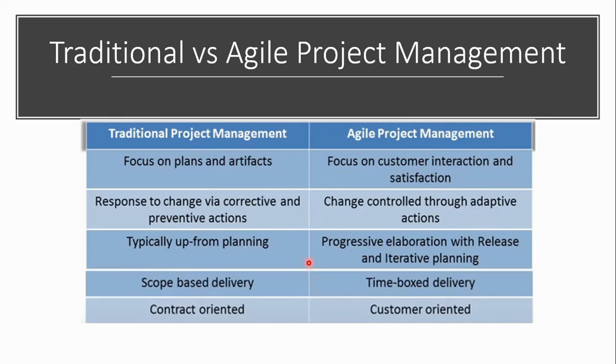But there is also, a point to note, the rolling wave planning method. For long-term activities, we can have estimated timelines, and later we can break down into more and more activity levels once the project is closer to those milestones. But here, of course, in the Agile process, it's more at each iterative planning. It will be more at the activity level.